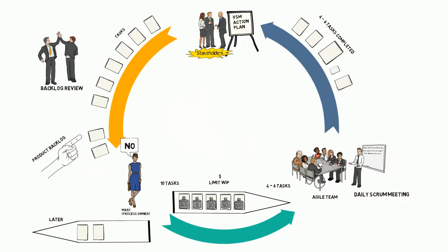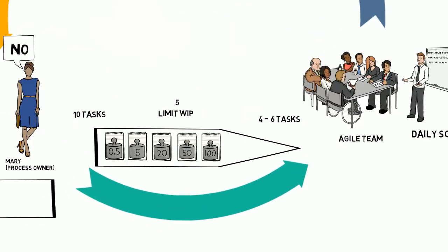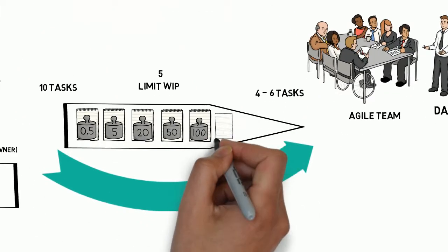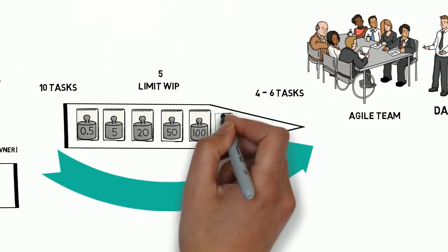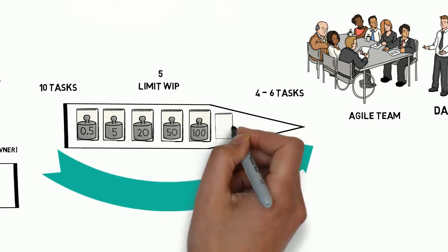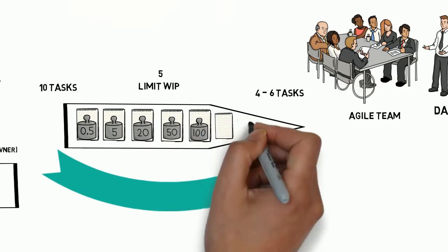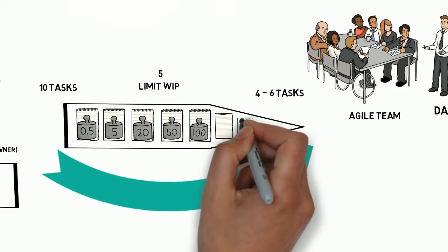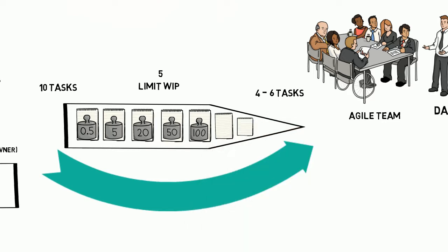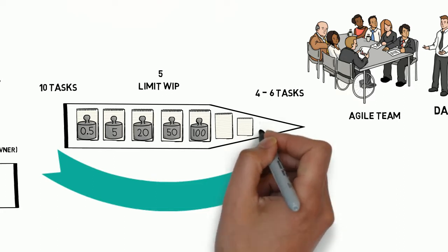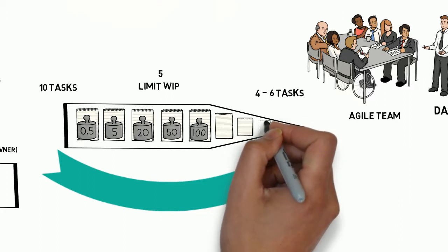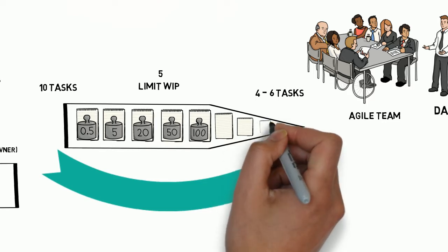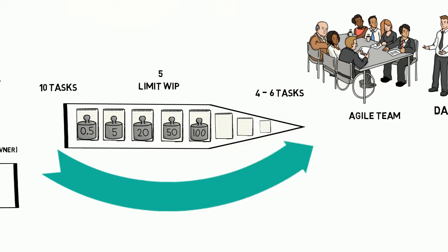Prioritisation is not enough though. In order to deliver quickly and often, we need to break the actions down into bite-sized pieces, preferably just a few hours per action. We want this nice funnel shape of small clear actions at the front and more vague actions at the back. By doing this breakdown in a just-in-time fashion, we can take advantage of our latest insights into the process and stakeholders' needs.